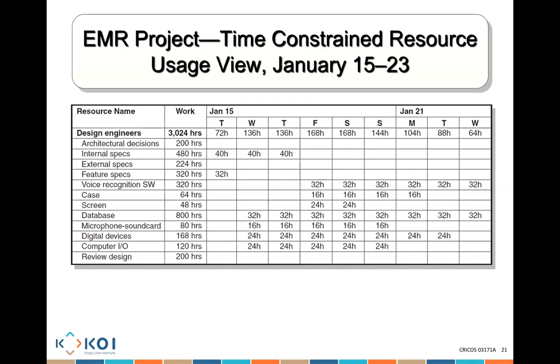So we should work efficiently to use our resources according to the fewer days. Well, if it's a resource constraint, it has to be done by a certain time. If it's a time constraint, then it cannot change. Sorry, if it's a resource constraint, which means you can't add more people, if it's going to take longer, so be it. It will take longer. If it's a time constraint, you will have to employ more people. Does that make sense? Okay, thank you. You're welcome.